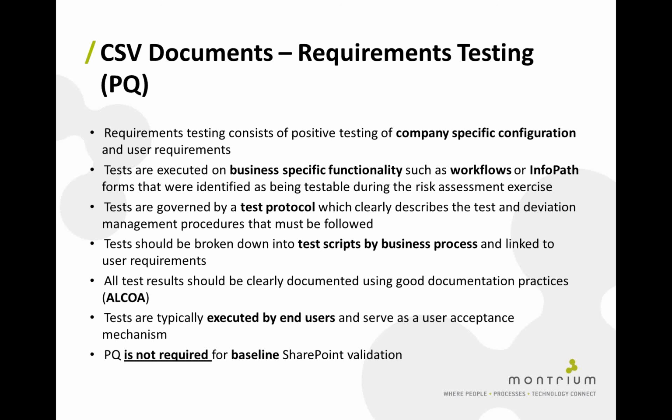The tests are broken down into business processes, so typically you'll follow a complete business process throughout the test script to make sure that the system has properly implemented the business processes that you defined in your requirements. The test scripts again have to follow good documentation practices, so they have to be ALCOA. These test scripts in most cases are always executed by end users, and again as a reminder, you don't need to do PQ for baseline SharePoint validation.